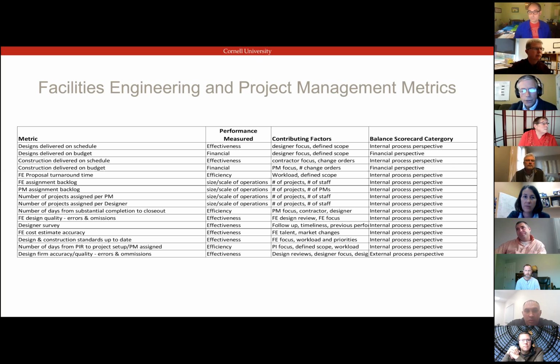And there are some reasonably acceptable percentages. Sometimes you kick yourself when you actually have to pay the money because it's frustrating. But there is a certain amount that you just end up having to deal with, and it's in the low single digit numbers typically, but it can be higher if you're dealing with something very complex, or you get into a bunch of unforeseens that you weren't able to ascertain ahead of time. It depends a little on the nature of the project.